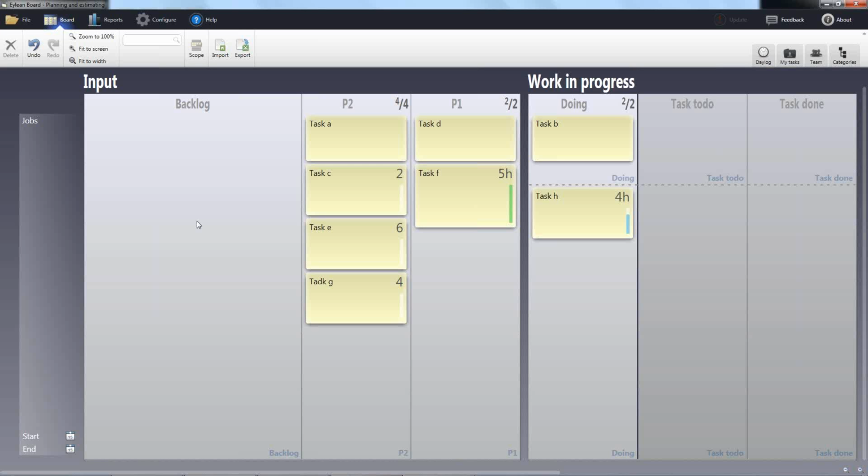When estimating, a senior engineer will say this job needs 4 hours, not 6, and the weaker person will think, all right, I need to say 4, I need to say even fewer hours so as not to show that I'm weak. So story points are an abstract value for individuals. One person can measure in one size, another in another. It leaves a lot of freedom, and it removes all the negative community feelings within your team. So collaboration becomes easier.